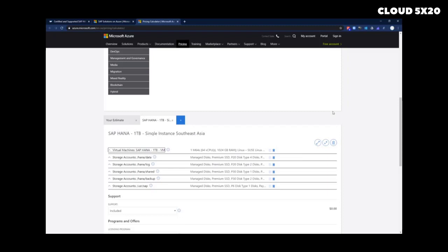The reason why I'm saying that is that they will run a sandbox environment for a certain period, and that sandbox environment can have multiple iterations. Okay, because when you do a migration project for SAP, it means that they have to at least do 2 iterations, sometimes 3 iterations when you're transferring something from a previous SAP landscape to SAP HANA, right?